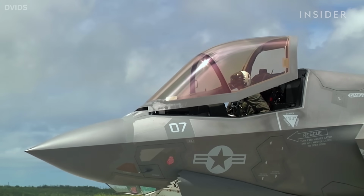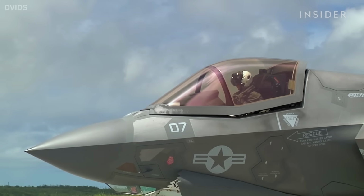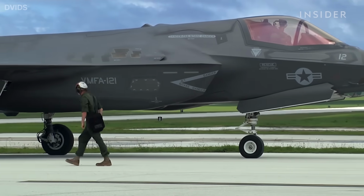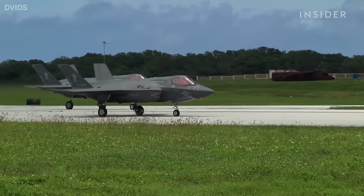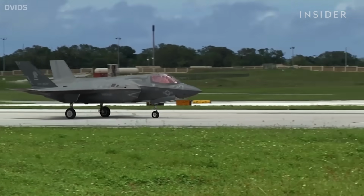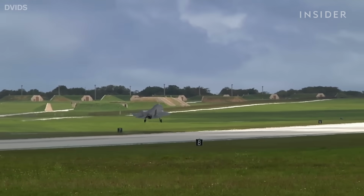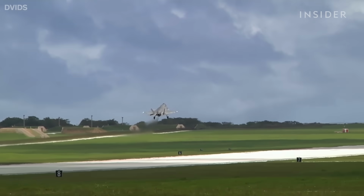It was part of the mess Bogdan inherited, because back in 2006, the DoD decided to enter production before testing showed acceptable performance. We were going to take all these new technologies that were not very mature, and we were going to integrate them in one big bang on the airplane and basically hope that it worked. The problem there is if any one of those technologies is not mature or doesn't work, it holds up the entire program.